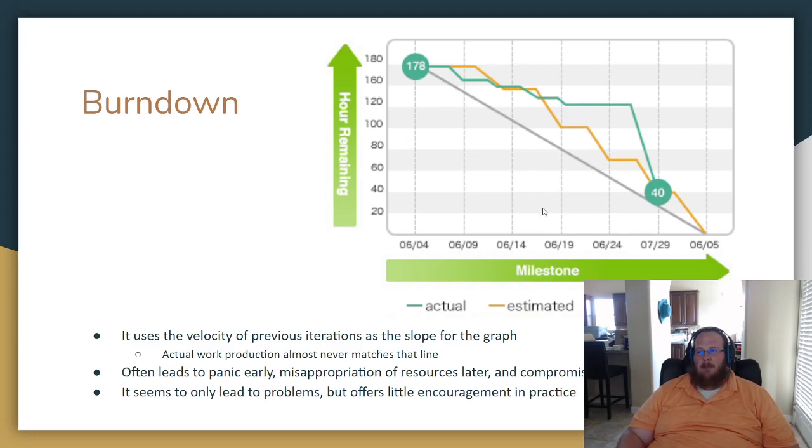And usually what ends up happening is that with these kinds of products, you have a bunch of pieces that have to be folded in and incorporated at the same time. So pieces will be like 99% done, but not actually done until the last domino falls, and the last domino knocks over like 10 other dominoes. And that's when you have this kind of a line go on where people actually got done, and then it caught up to meet the line.